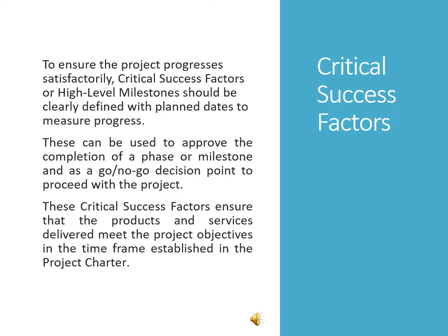These can be used to approve the completion of a phase or milestone and as a go or no-go decision point to proceed with the project. These critical success factors ensure that the products and services delivered meet the project objectives in the time frame established in the project charter.